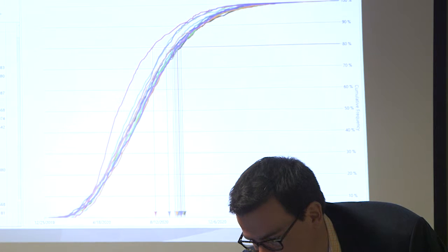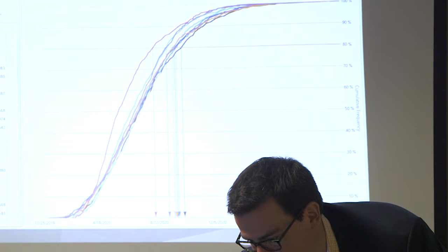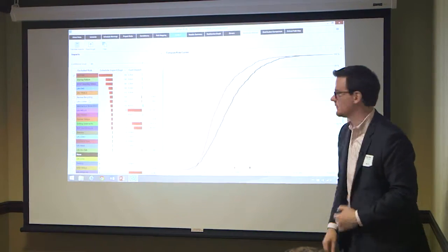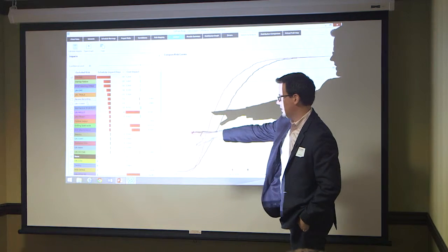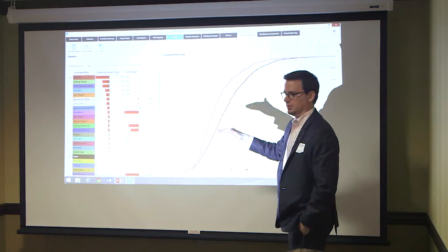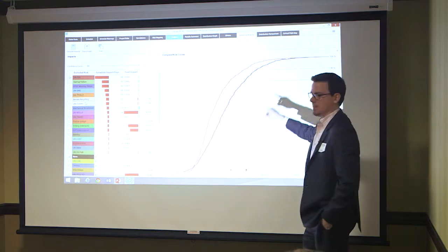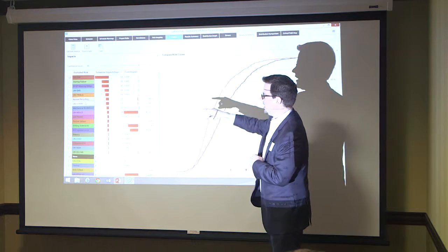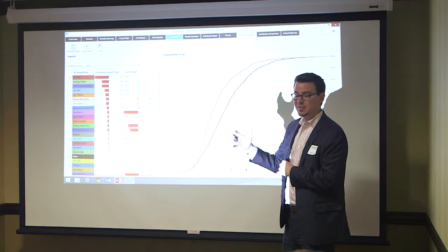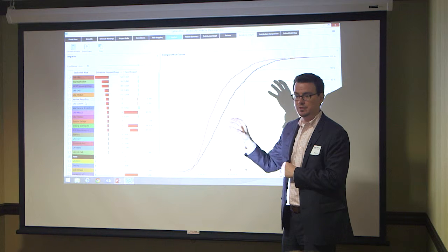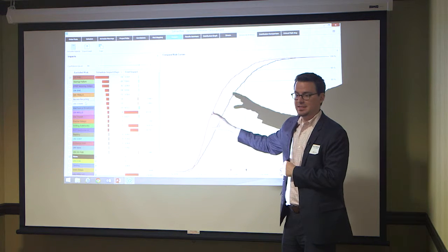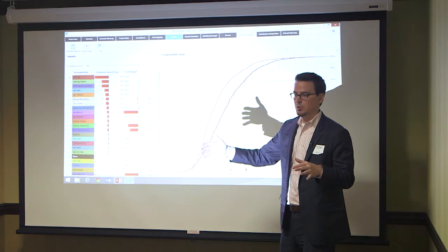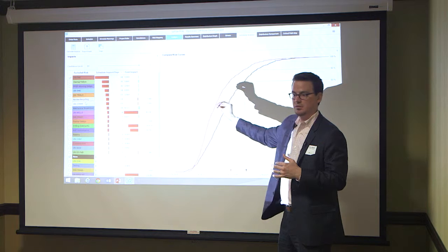So what I want to highlight here, right? I'm going to focus on just our risk baseline and the top risk that we've identified. Effectively, I'm looking at none, and none is no risk excluded. So this black line represents my risk baseline. That's the total spread with all of my risk included. I've now removed the uncertainty around my fabrication. So here's a case where uncertainty is actually one of my top risks to my project. I couldn't see that if I had applied uncertainty as just a generic 3-point estimate against my activities at the activity level. We only get that insight because I've named it inside my risk register, right?